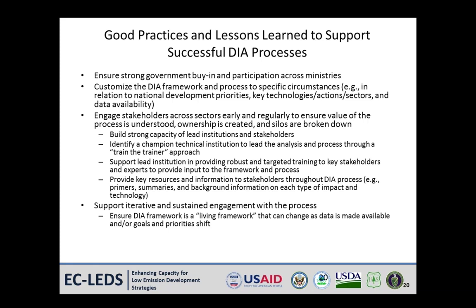One key aspect of success here in Zambia has been the provision of information early in the process to inform broader stakeholder input and engagement. For example, it has been very helpful to provide initial definitions of impacts and technologies included in the framework, as well as summaries of analysis and data available on the impact of each technology and action.